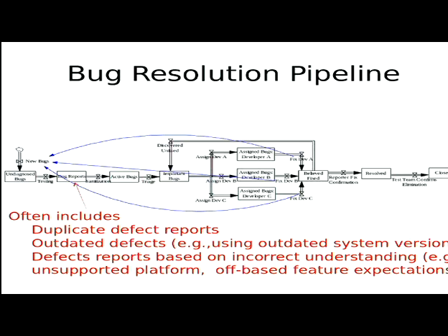And in fact, in commercial software projects, before you roll out or before you ship, if you have to fix a defect in the end game, really, really late, you're going to do so with a level of precision that's often associated with a surgeon. You're going to be wanting to study this problem extremely carefully. Why is that? Why do I say especially late in the game? Might cause some side effect that would cause a final build to have some bug that no one's ever seen. Yes, and if it's really late in the game, that might not be discovered before you roll out, right?